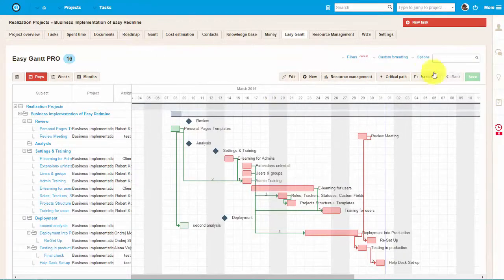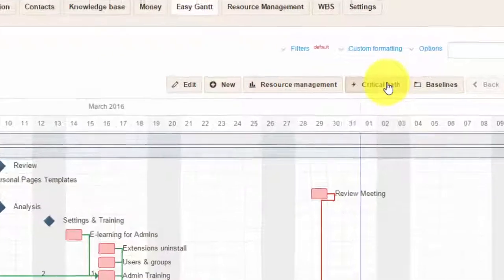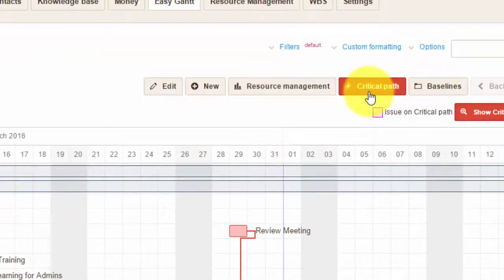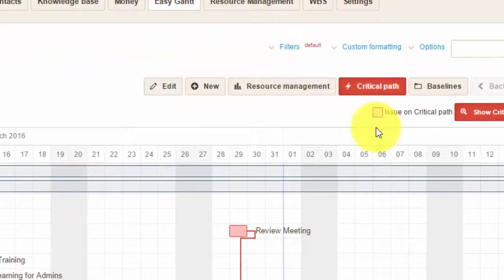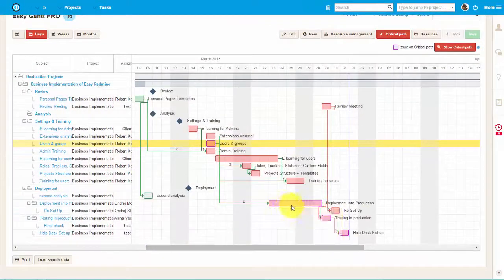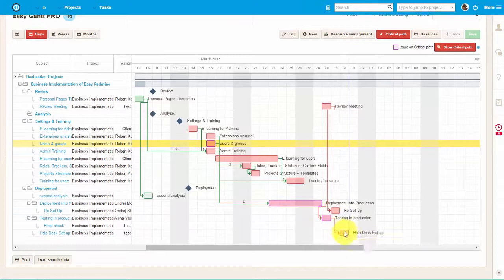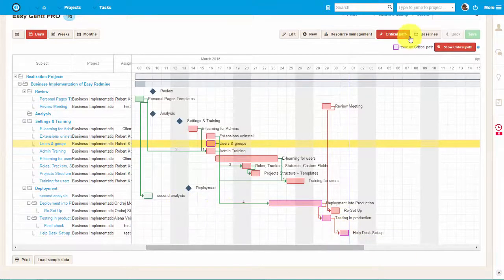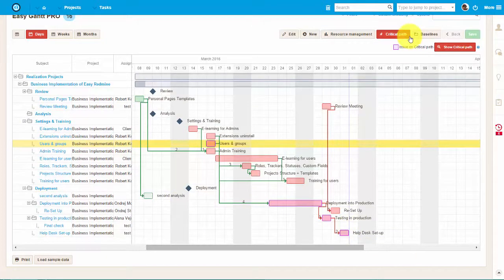Let's have a look at a more complex project. Here we can make use of Critical Path, which will show us the tasks, delaying which would have an effect on the overall timely completion of the project.